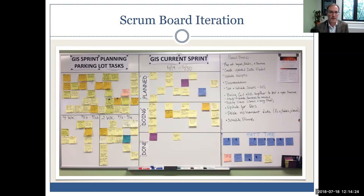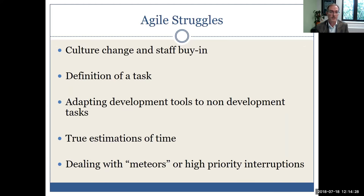We added a two- and four-week sprint planning section. When requests come in mid-sprint, we can tell customers: we're already scheduled out, but I can put you on the two- or four-week horizon depending on priority. We work with them to meet their needs while staying within our plan. Having the board up really helps with transparency among our group during daily standups, and customers can come in and see exactly where we are.